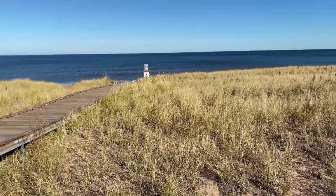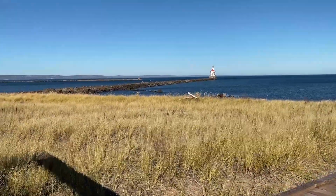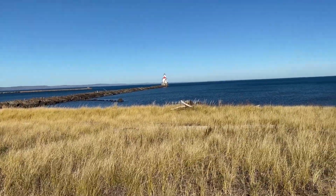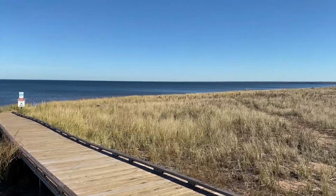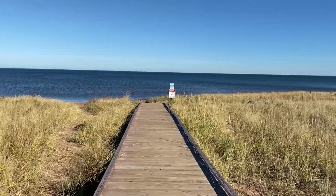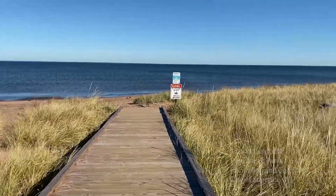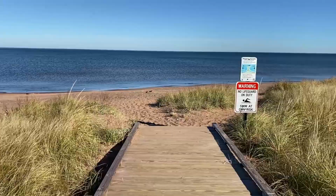We had all the regulators on site for pre-application meetings, discussing with them the concepts early in the design phase. So when it came time to submit the permits and when it came time for them to review the permit applications, they had already been involved, had given verbal input, had seen the site, were involved in conversations with us as far as seed mixes and plant materials to use. So just keeping them involved from the very beginning makes the permitting a much smoother process. I also think that just being open and willing to modify along the way and to change things along the way as potential challenges come up.